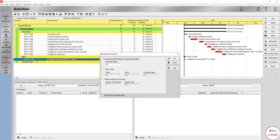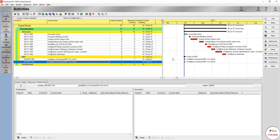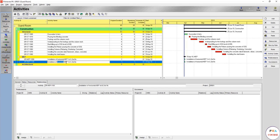Take copy here. As you see, increment value—you need just to increase by 10. For example, the 1090 will be 1100. Or replace the beginning characters. For example, you don't want GR dash MEP, we don't want the GR dash ARC. You're going to see this in the architectural works as well.